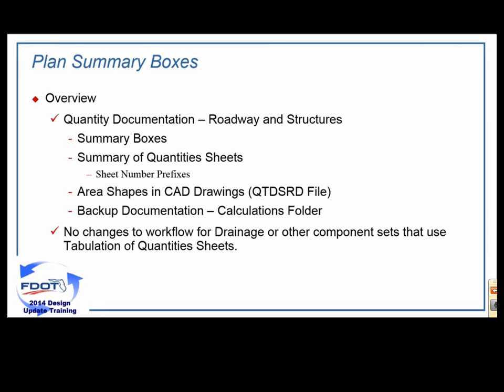All backup documentation is to be put in the calculations folder. This is a new folder that got added back in August when we released the FDOT SS2. And this calculations folder will hold PDFs, the Excel files for their templates for their summary boxes, any other Excel files that they may create, or Word documents that may be created that have formulas, or any other backup documentation for any of the quantities.